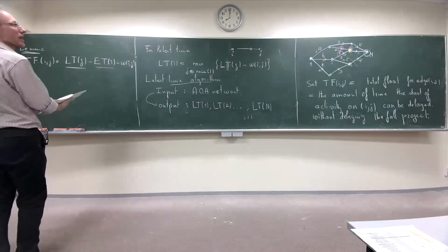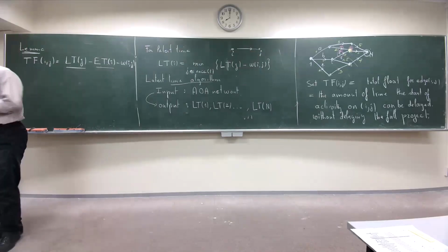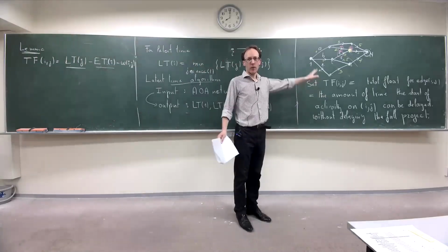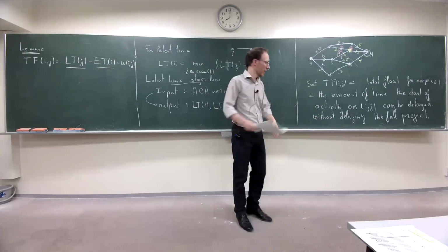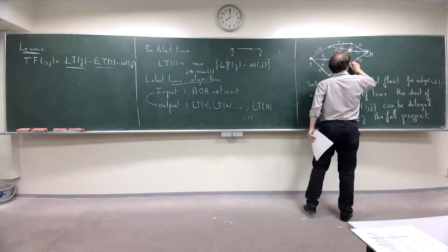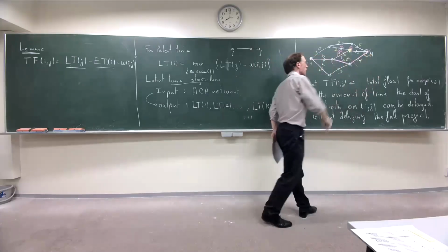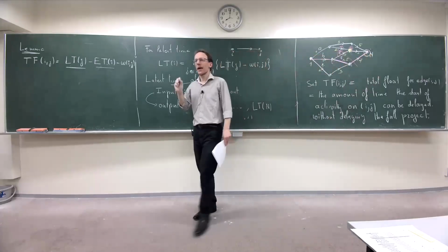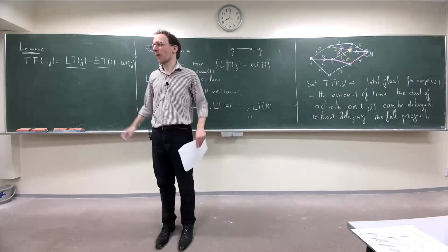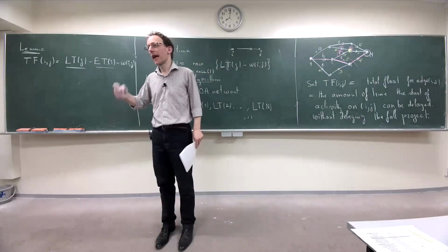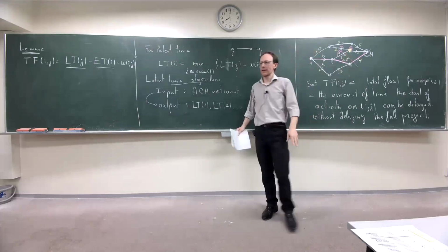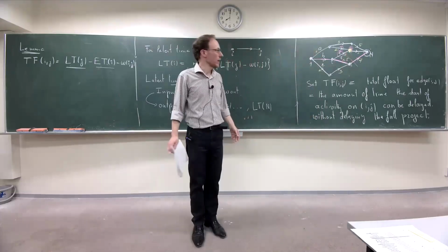Okay, exactly on time. There is one more notion, I'm not going to write it. There are critical paths. What could be a critical path in this? It's a path where you really have no time: at each edge, you cannot wait. So a critical path is in a sense the longest path, because if you delay at any place in a critical path, then the full project is delayed. And of course, there should exist such a critical path.